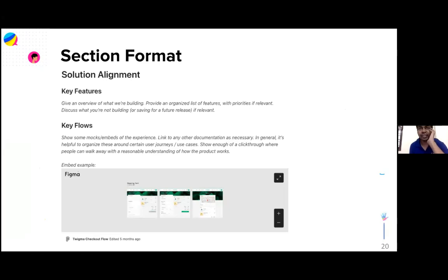No, so I was just saying there can be different sign-offs at different stages of the document. You can have one sign-off on the problem statement, once you define the problem statement, then another sign-off once you define your user stories, then another sign-off once you have design ready. And you can decide who the stakeholders are at each stage of this. And we actually put this directly into our checklist for PRDs. I'll talk a little bit more about that when I talk about the launch checklist. Sure.